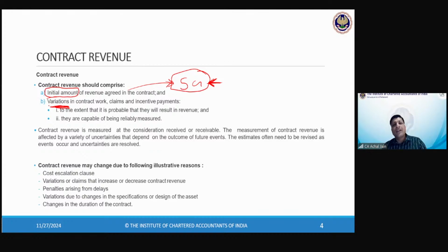So you said, please understand, if you complete the work in 2 years, then over and above 5 crore, I'll also pay you 50 lakhs. If you don't delay, I'll pay you 50 lakhs more, but if you delay, this 50 lakhs will not be payable. This is what you call an incentive.